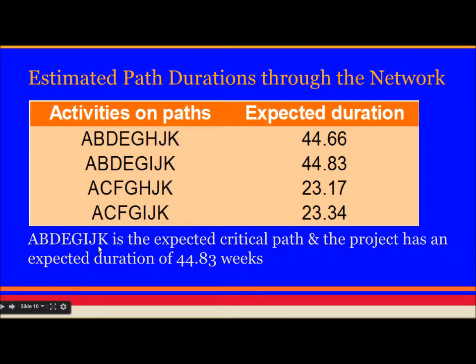Now the expected duration comes as these for each of the path. And the critical path becomes this one. A, B, D, G, I, J, K is the expected critical path. Which comes to be 44.83.